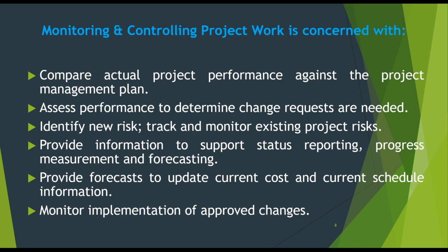Monitoring and controlling a project or process is concerned with comparing the actual performance of the project with the project management plan. It assesses performance to determine if any changes are needed, identifies new risks, tracks and monitors existing project risks, and provides a risk mitigation strategy. It also provides information to support status reporting, progress measurement and forecasting, provides forecast to update current cost and schedule information, updates documents, and monitors the implementation of approved changes for any effect on schedule or budgets.